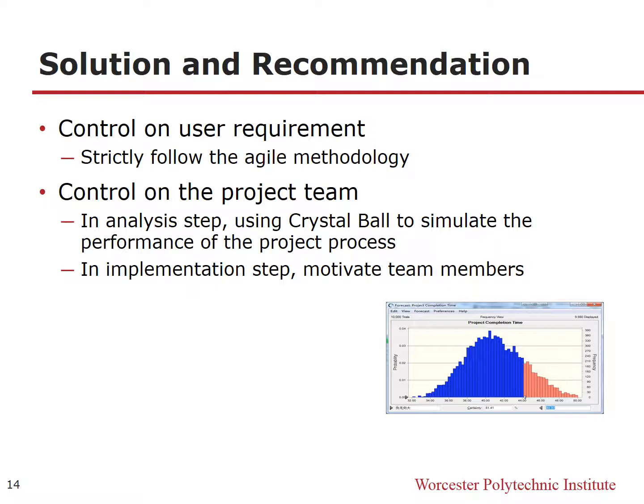Here we use this tool to simulate the influence of overestimation and underestimation, mainly from the developer side. For example, for the new technology, maybe we thought, oh, 10 days is enough, but actually our worst estimation is 20 days or 30 days.